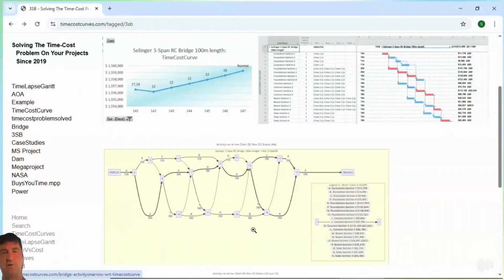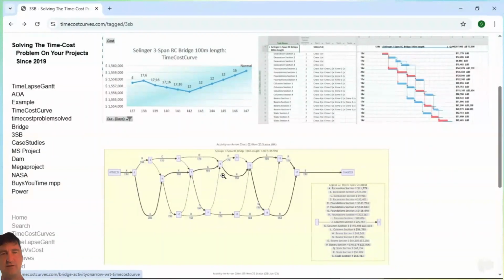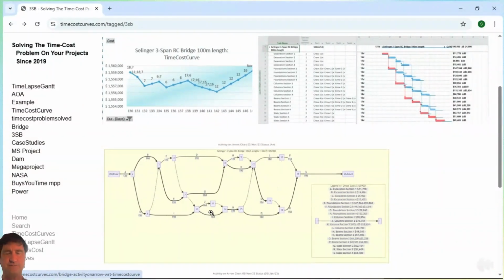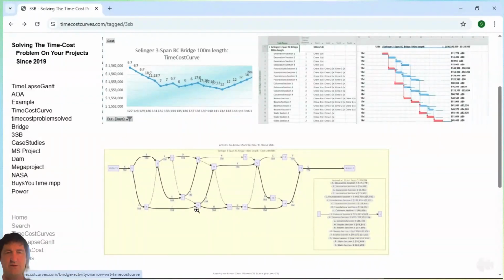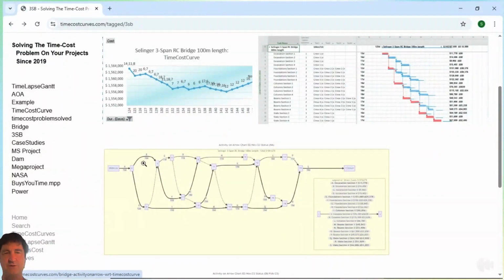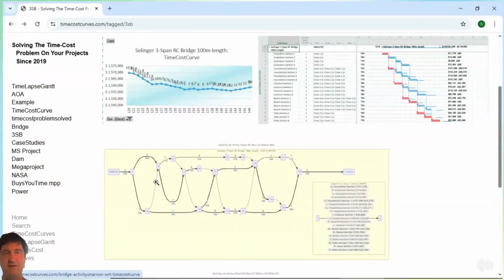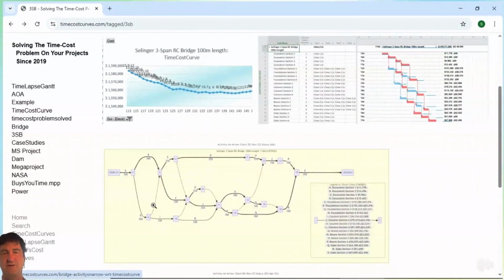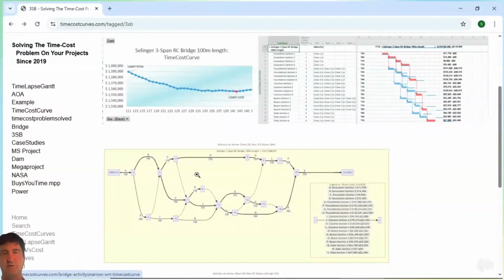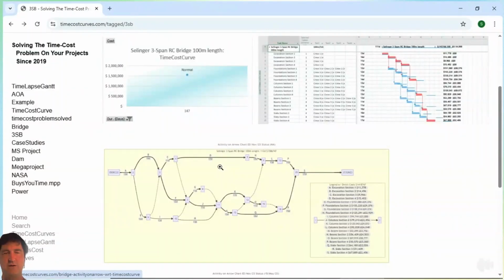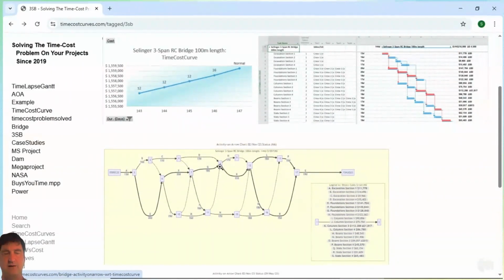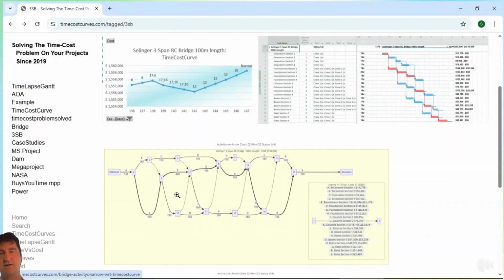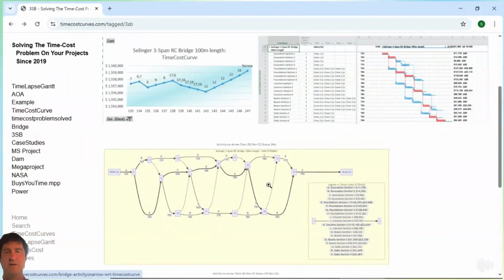Okay, the dotted activities are the dummy schedules. So that's logically saying that after a certain event happens, which is after a certain activity is completed, that completion of that event is tied into the start of subsequent events using these dummy logic ties. So that's why they change as the network is compressed. And it is the logic that ties it all together and again gives you valid results. So that is drawn from the Gantt chart.